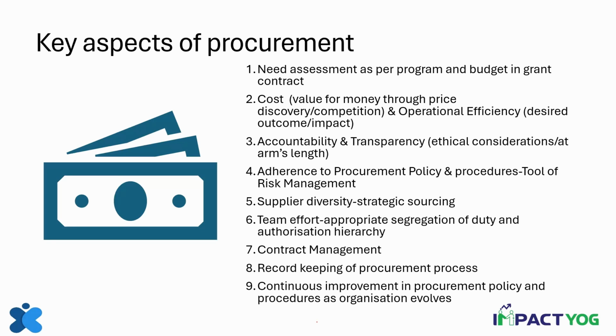Generally, you will not purchase anything which is not included in the program narrative or in the budget, unless it is included subsequently through a post amendment in the contract, because then you realize that probably this was also something that you needed to have with you. So that is the need assessment, which is very, very important. You will not purchase anything for the sake of just keeping it as storage.